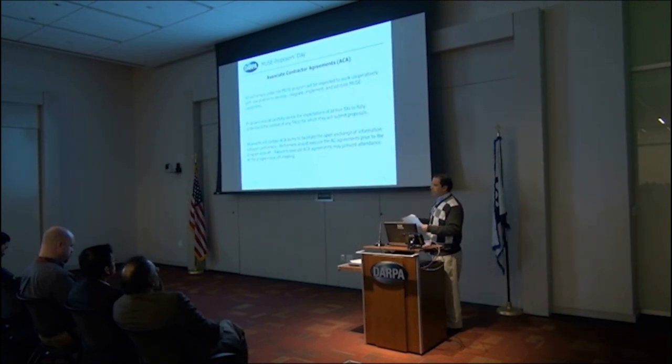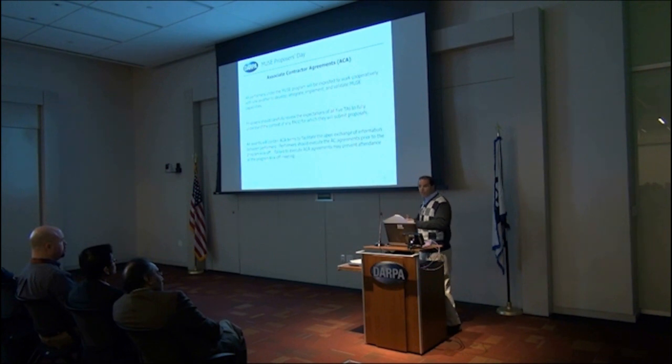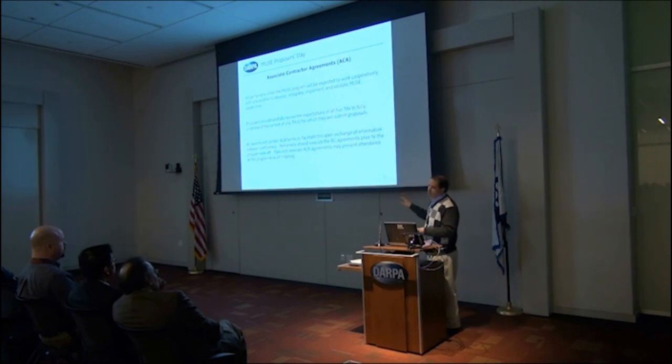But ultimately, it's going to be the responsibility of each of the selected teams, once you're all identified who's who, to actually go through and start negotiating those things. And they'll have all kinds of things, roles and responsibilities, who's flowing what information in each direction. It'll have language about roles or responsibilities regarding data rights and intellectual property. As you guys start passing information back and forth, that becomes an issue. Those are the types of things that get laid out. It takes some time to put those things together. So you have to make sure that you start that process as soon as possible.